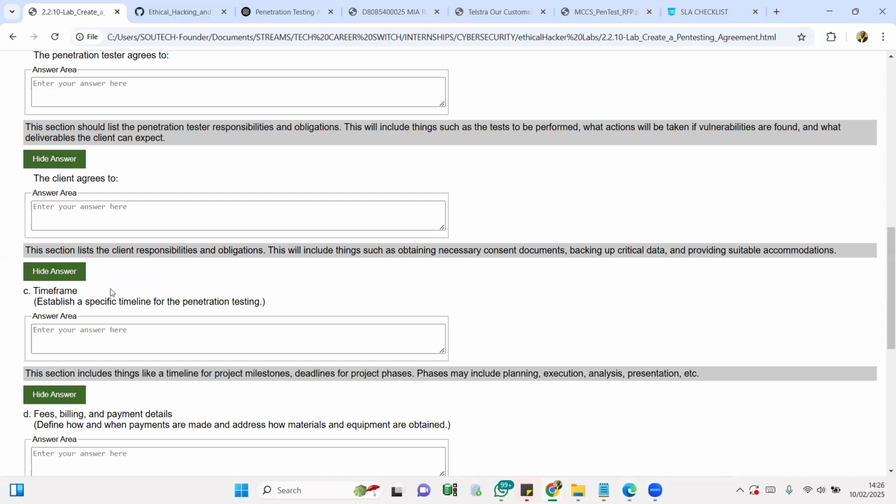For instance, a client can engage you and tell you, okay, please, I have a website, I have a network, I have a cloud application, I have a mobile app we're creating, we created this particular API. Can you do testing for us? Right? Now, the client is meant to provide quite a lot for you, depending on what kind of test. Normally, we're going to send out a sheet, a document that spells out what task the client intends us to carry out. Then with that document, we can provide a quote. With that quote being agreed on, we can provide an agreement. After the agreement, we can provide more detailed documentation, and then we can kickstart.